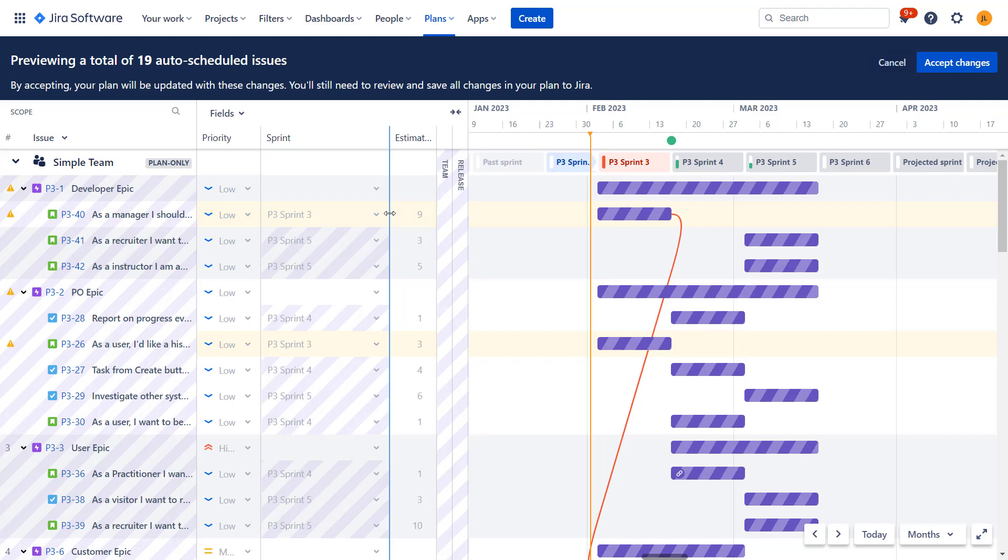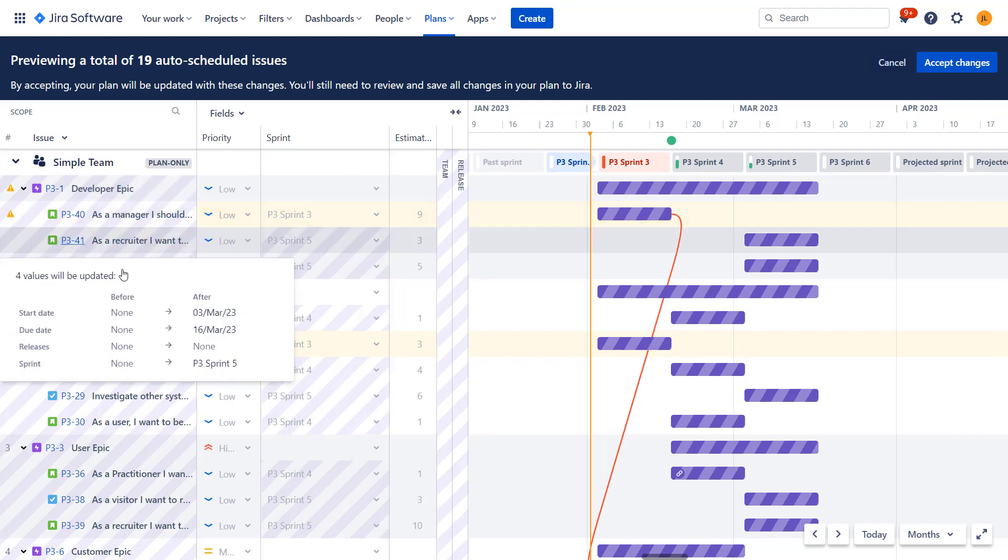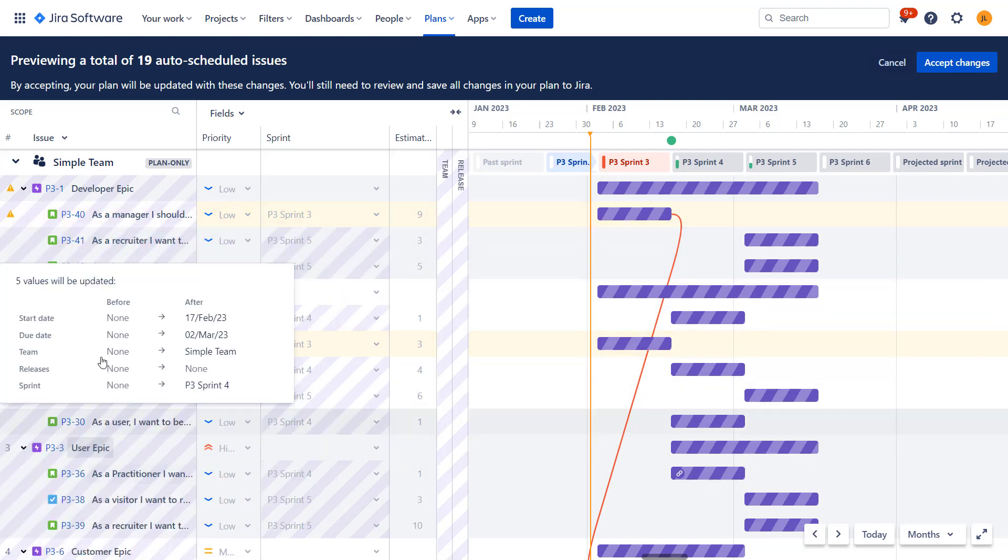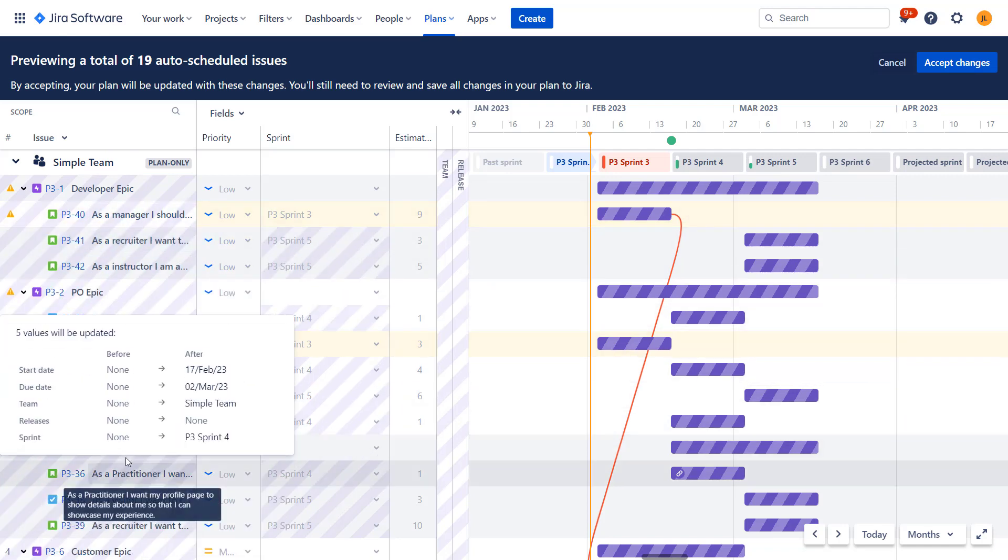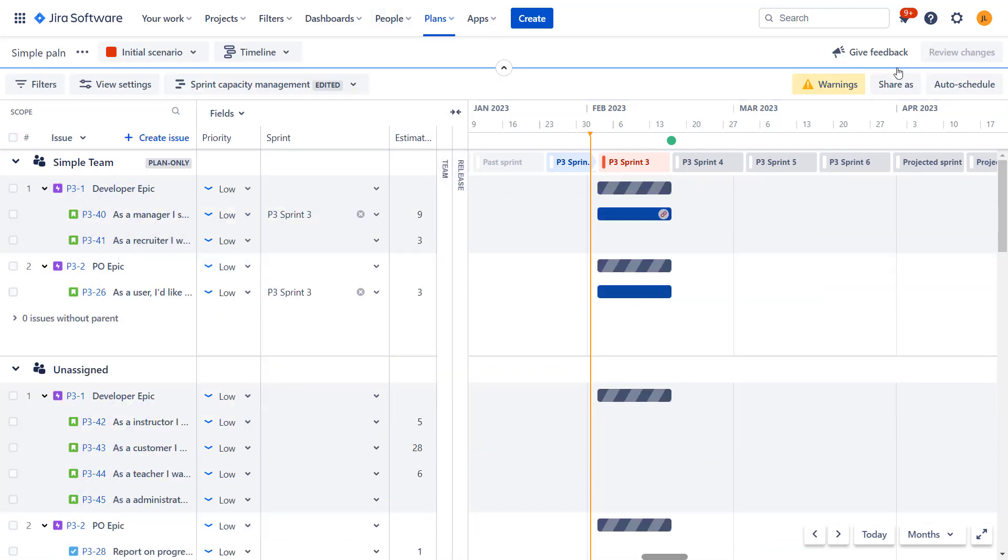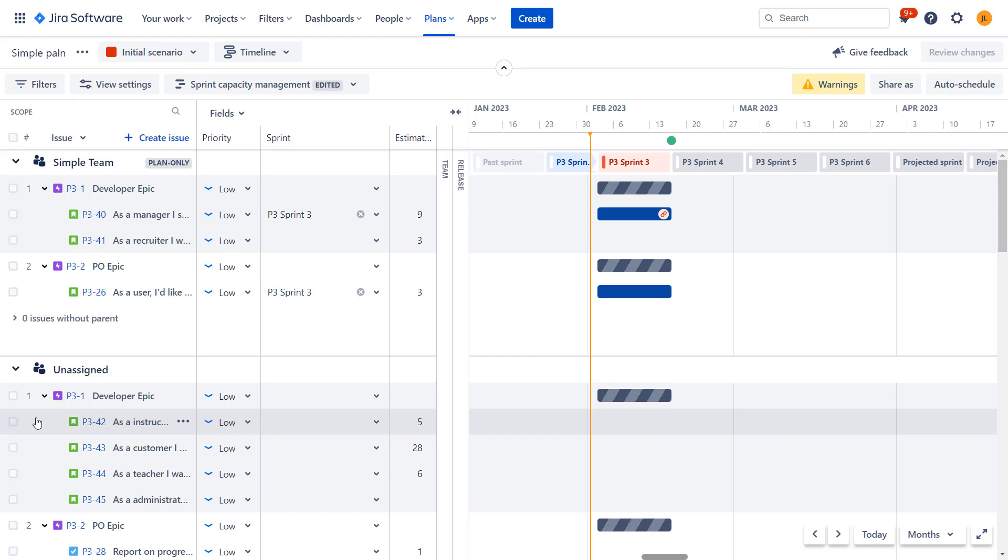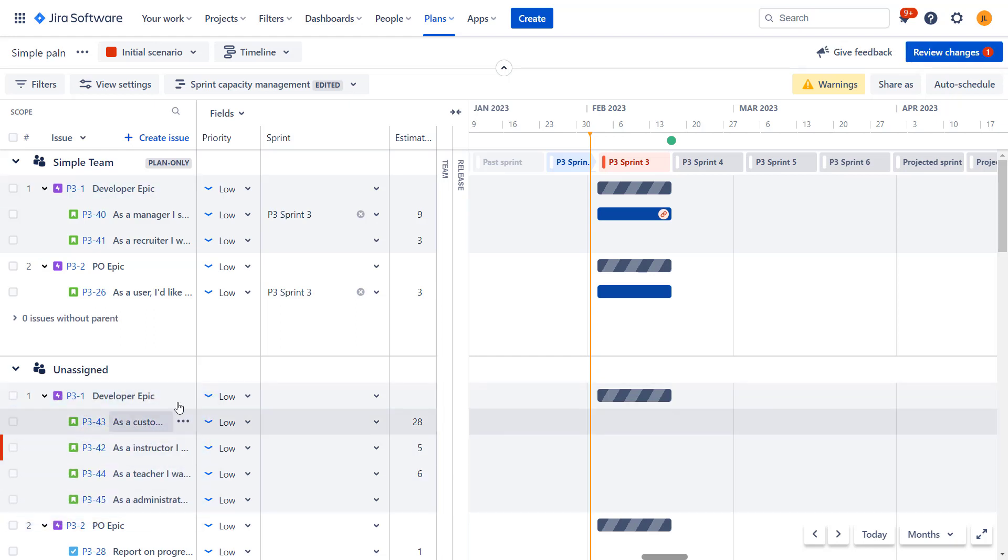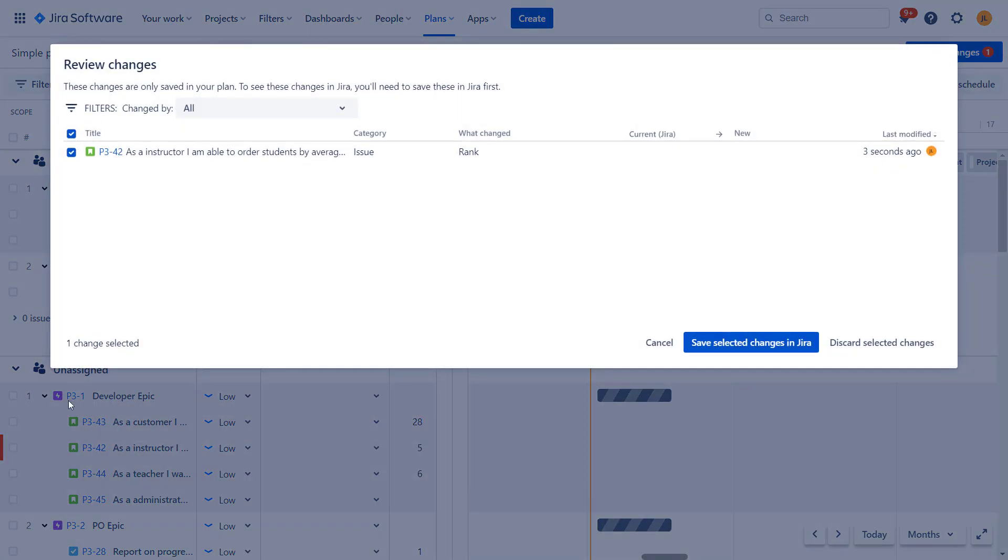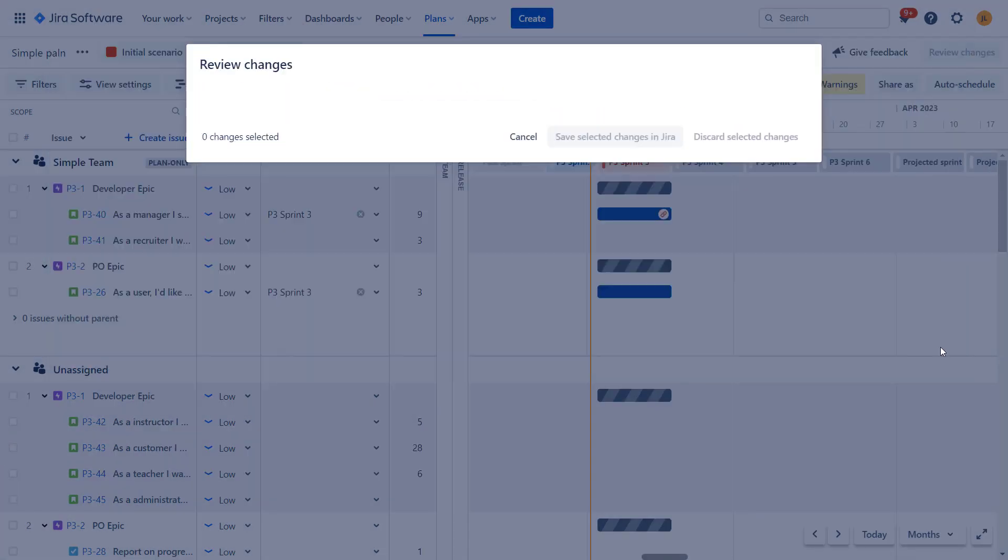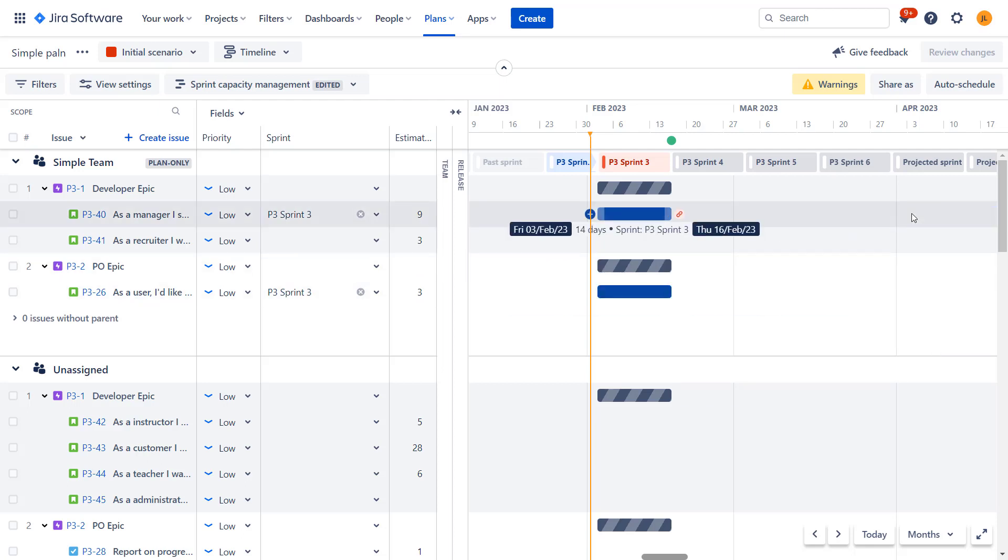By the way, when auto scheduling is doing scheduling, it takes into consideration the order of the tasks on the list. It's called the rank. So the tasks that have higher rank will be scheduled first. So when you move the tasks around, you can actually get different outcomes when scheduling. This is something to remember, something important. And yeah, I just updated and you will see that the rank change. I will discard this for now. Okay. So that was first try.